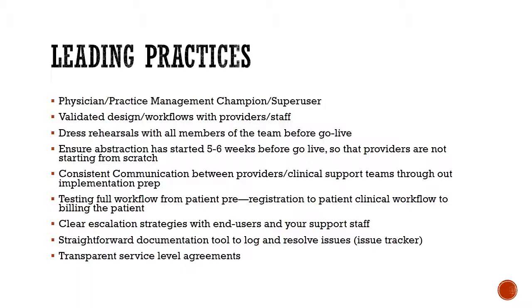Abstraction, we touched on this. It's important to have that strategy in place, and it's important that you actually either increase your staff or allocate more hours to your staff, decrease some activities, so that your system is ready and it has enough information to help your providers and your practice management staff go through them in a faster, more efficient manner, rather than treating all your patients as a new patient, especially when you have plentiful information in your paper charts or your legacy systems.